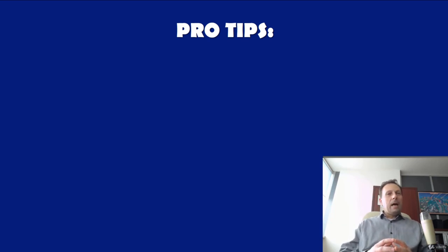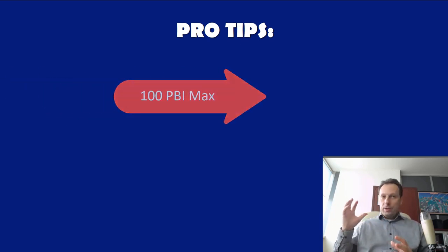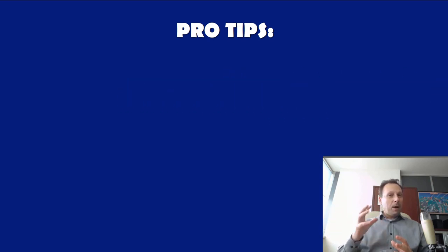And lastly, size of a product backlog. So how big should a product backlog be? A general rule of thumb is that the product backlog should have no more than 100 items. Larger than that, it becomes nearly impossible for one person to prioritize the product backlog effectively. In the case of 700 plus maintained items, you can try to cluster similar requests and delete items that were more than, for example, 1 year old. Through this process, try to reduce the product backlog items to 100 max.